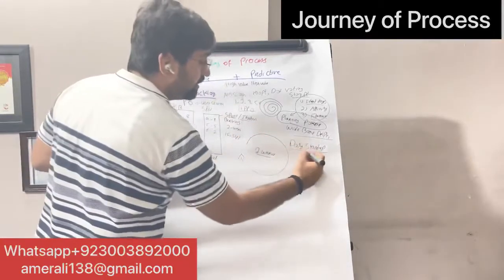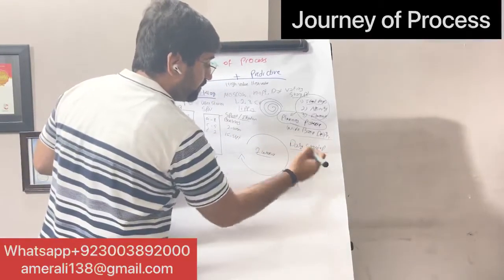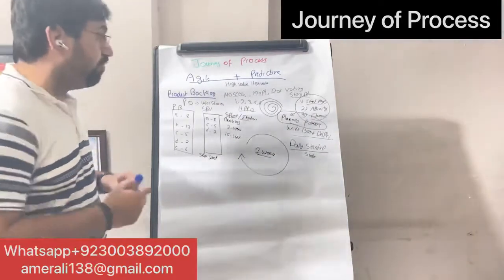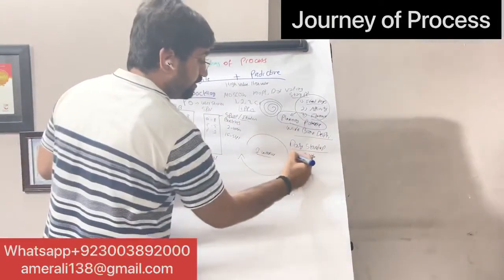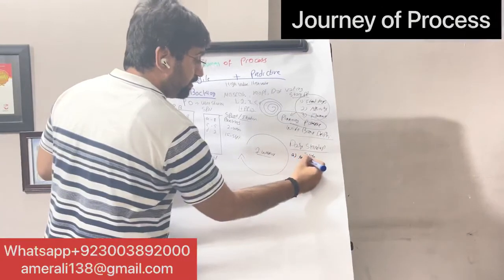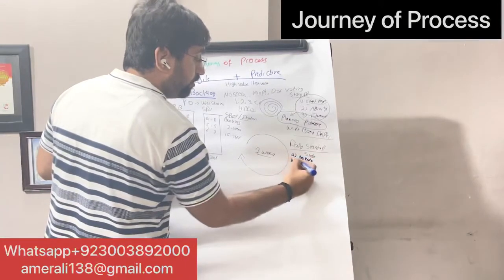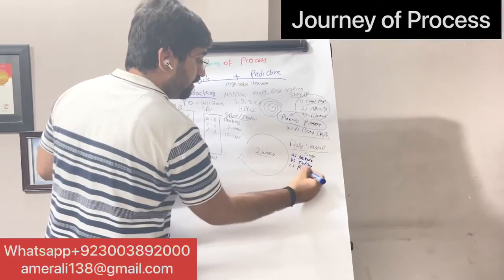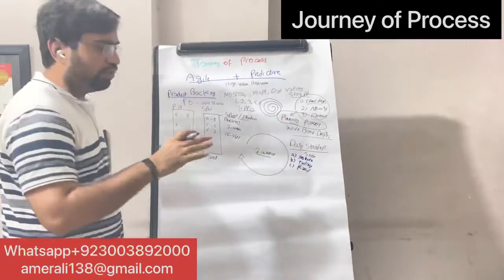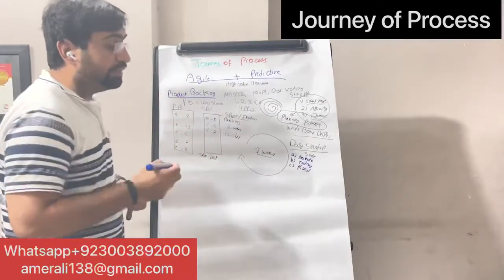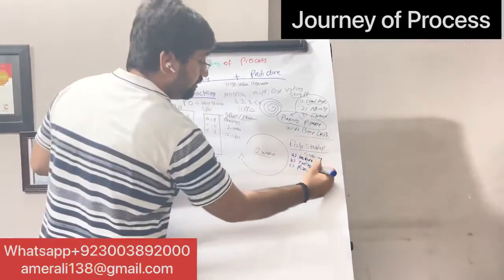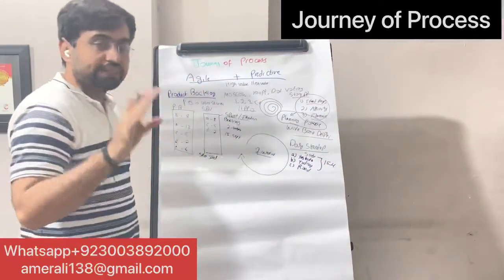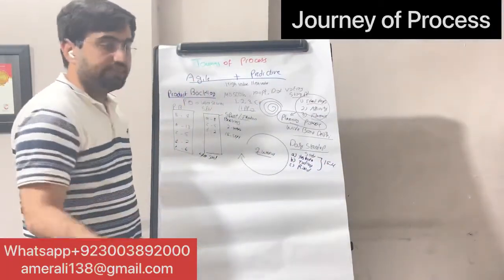You can also consider this more of a status meeting. We have 3 very important questions here. What did you do yesterday? What are you going to do today? Is there any impediment or roadblock? Impediments, roadblocks, risks, all those things. The duration of this meeting is 15 minutes, same place, same location, same timing.